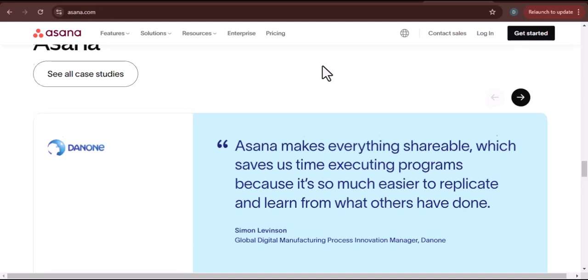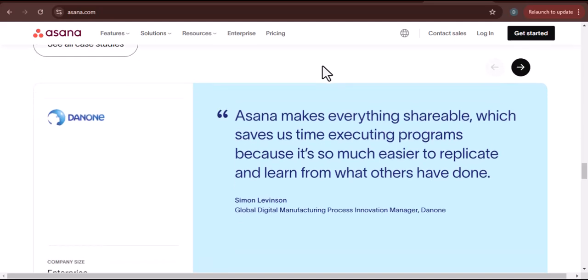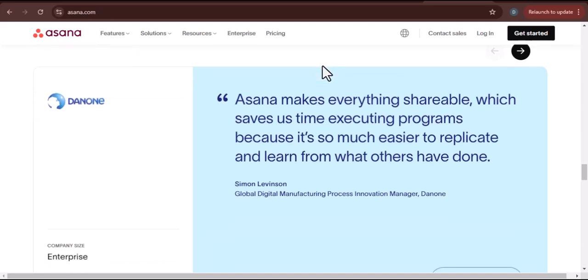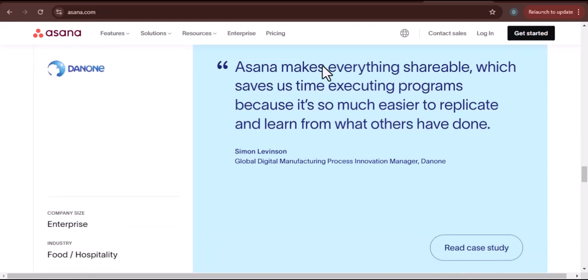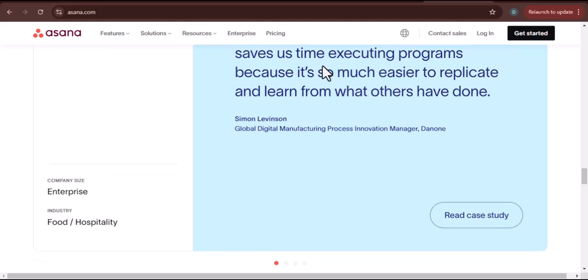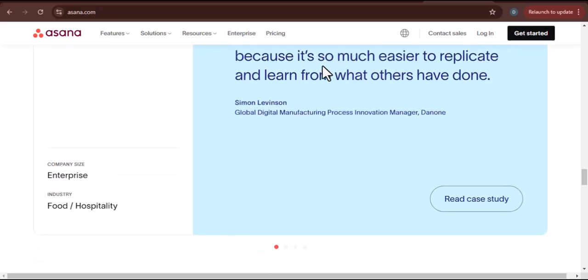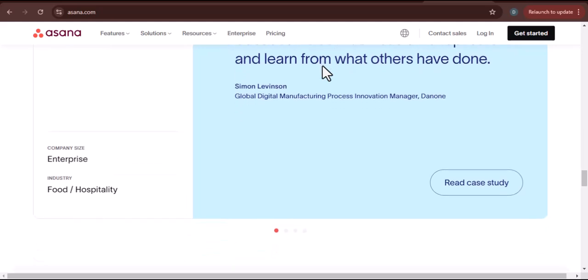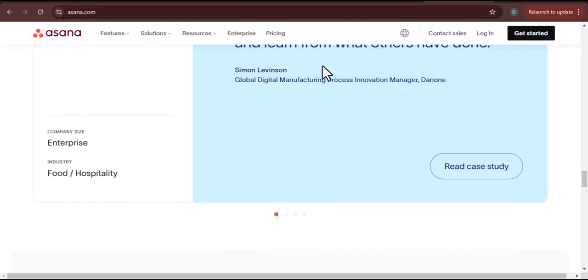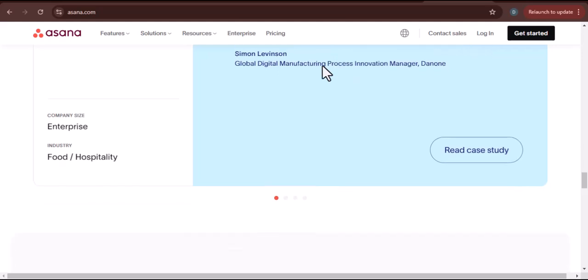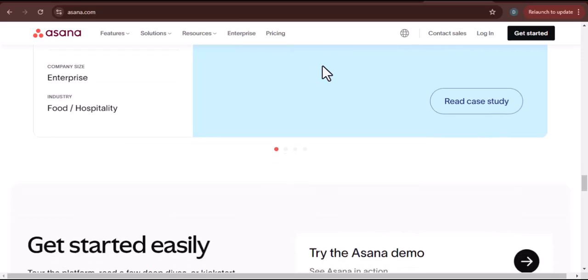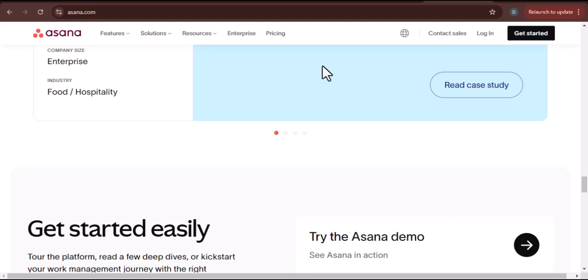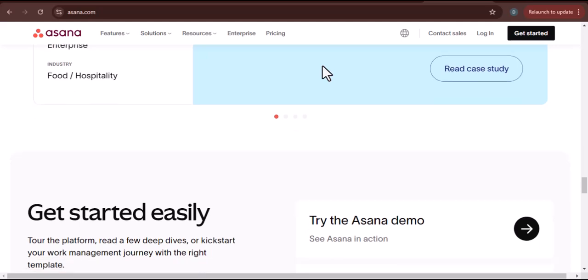Another powerful technique is to use Asana's automations. Let's say you have a team that needs to get budget approval before spending. You can set up a rule that says, when the estimated cost is greater than $1,000, automatically add a subtask for budget approval and assign it to the project manager. This creates an automated workflow that ensures no significant spending happens without the necessary sign-off, saving you from a lot of headaches down the line.